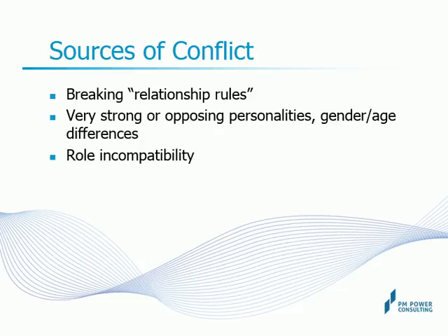Although they are both working to achieve the same project objectives, the differing focus of their roles often causes conflicts. A development lead could be more focused on timeliness of delivery, while the test lead could be focused on unearthing as many defects as possible. As you can see, there are many such role conflict situations in organizations. They are often there by design to establish the necessary checks and balances in day-to-day operations.